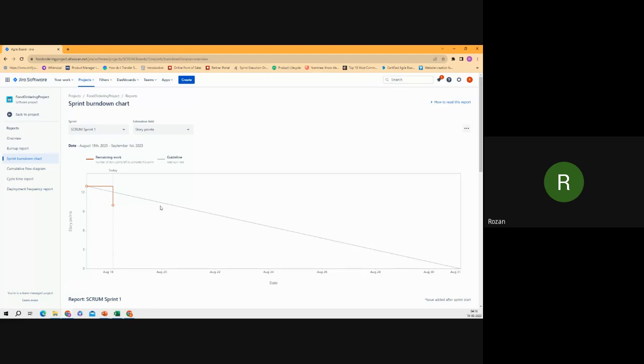Now, do we always make the sprint burn down chart based on the story points and the date? Those are the only two things? Yes. So we make a sprint burn down chart only with the help of story points and the dates, always, right? Yes, correct. Nothing else, only story points versus dates. That's it. Clear, right? Any questions? No, not on this one.